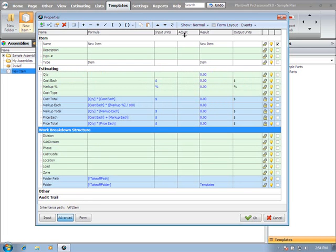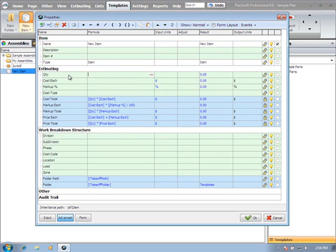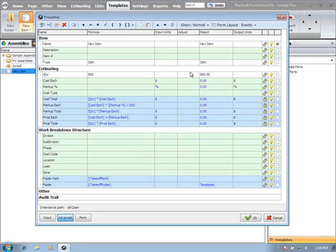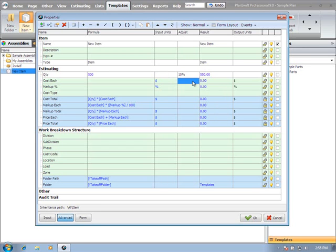When using the adjust column for the manual adjust, I'll just do a quick example here. Under quantity, if I were to enter in five hundred for my quantity, if I wanted to adjust that quantity by fifty, I could just type in fifty. Or ten percent to add an additional ten percent to that number. Just a handy way of making some manual adjustments to your takeoff if you need to. That works in any of the columns.